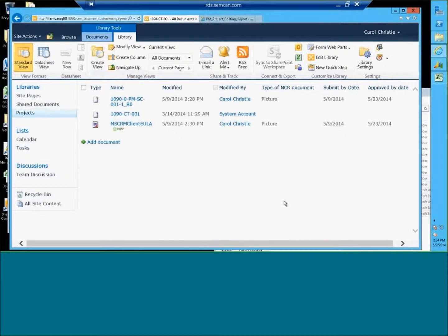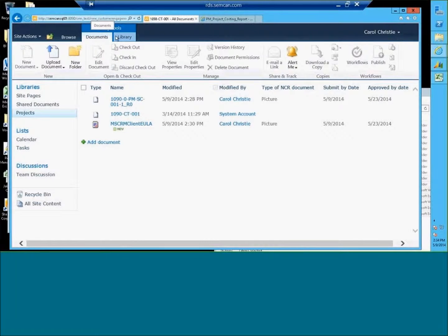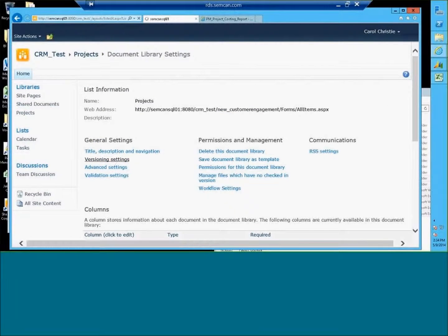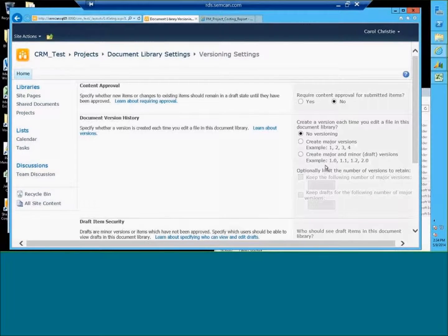Now, we use file name of RARB, for instance, for versioning on Rev 0. We only give the 0, the 1, the 2s once we internally finish it, and it goes to the outside of our company. Does this have the ability to track against like one type of versioning, like our ABC, and then switch to 1, for instance, when we say it's controlled now? It has this concept of major version and minor version. That's exactly what I'm looking for. Major and minor. Yeah. Okay.